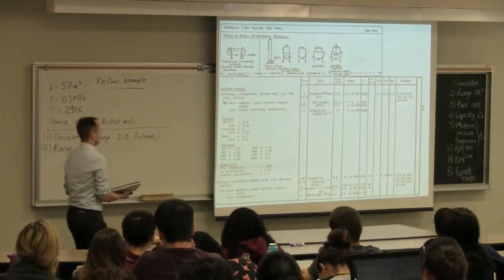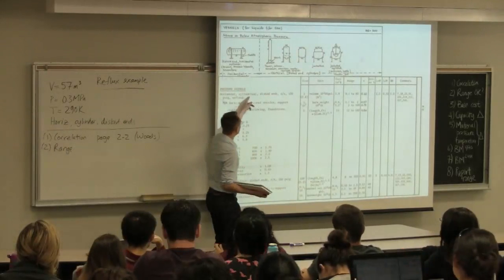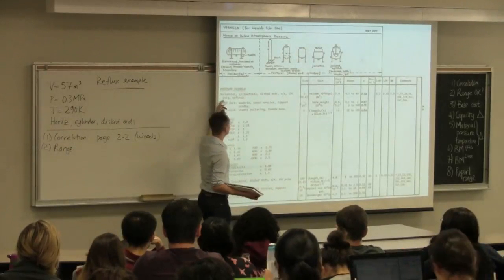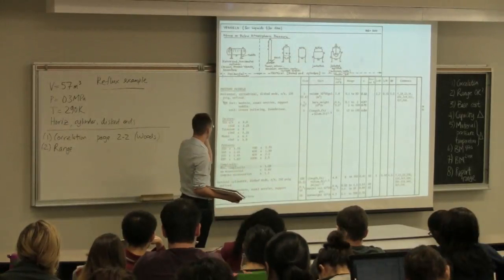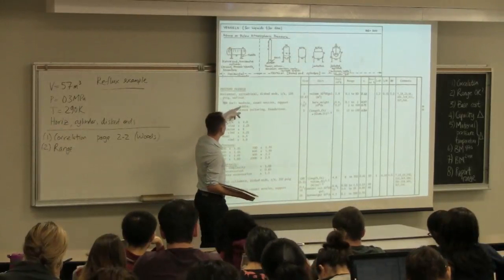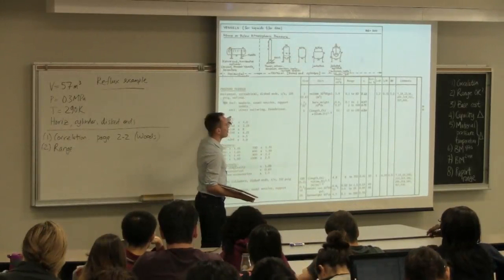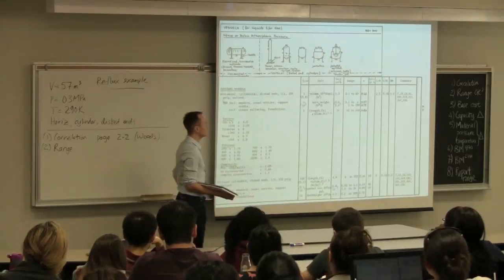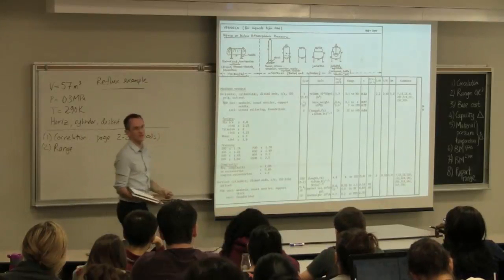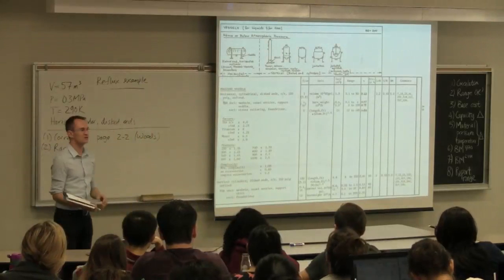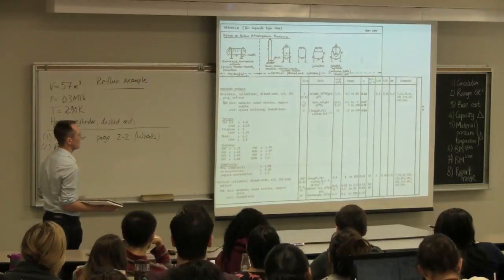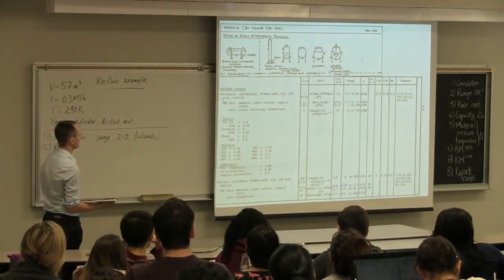Made from cylindrical unit, dish ends, carbon steel, 150 PSI rating, unfired. Your FOB includes the manhole, the nozzles and support, and the saddle in which it rests. But it does not include structure, leaving out the foundation for the unit. So that's what the $1,900 gets you back in that time.